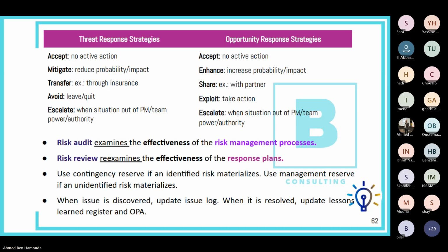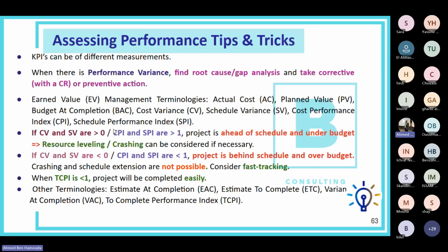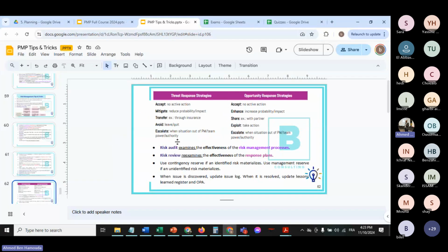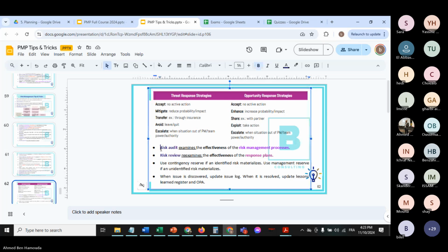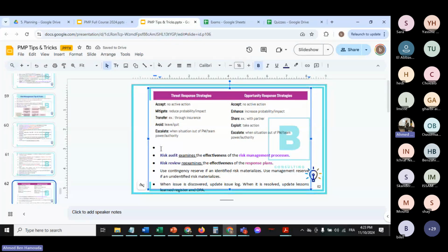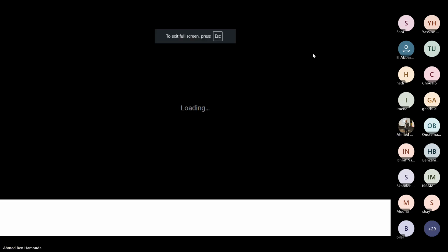Once you escalate, let me add it here. Once you escalate, no further action is required from you. Not even monitoring. Nothing. No further action is required from you. So once you escalate, no further action is required from you.